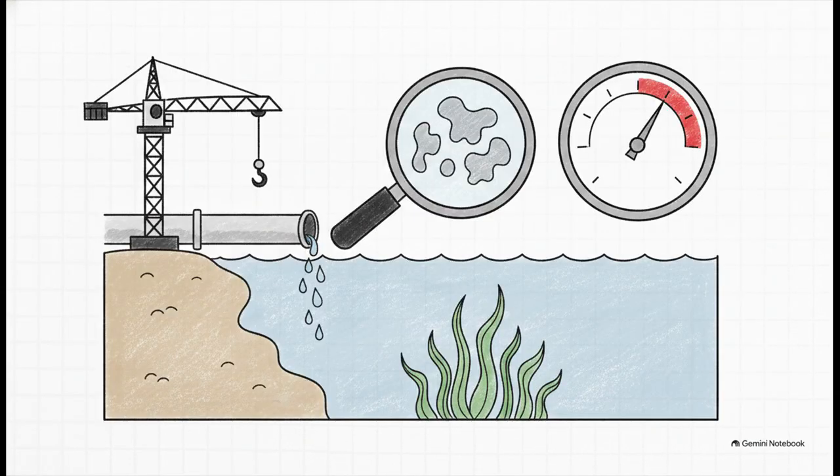Here's another cool example that shows just how adaptable these reports can be. The We Build It Corporation had a construction project near a lagoon, and their outcome was to protect the local seagrass population. For the response indicator, they monitored chlorophyll A concentrations, which tracks phytoplankton levels that spike from nutrient-heavy discharge. The response criteria: that concentration must not exceed the 80th percentile of their initial baseline data. If it surges past that, a formal investigation is immediately triggered to fix the root cause. Because trust me, nobody wants to be the site manager who accidentally wiped out the local lagoon ecosystem.